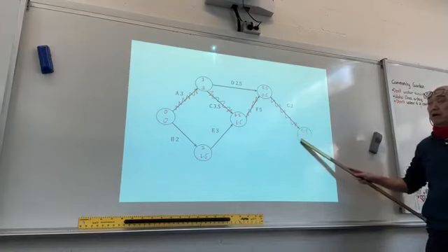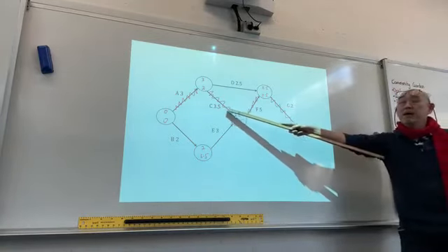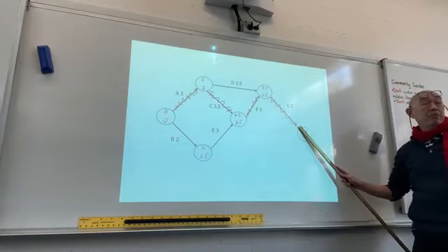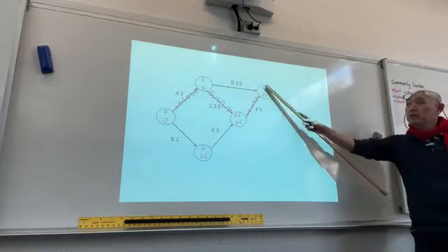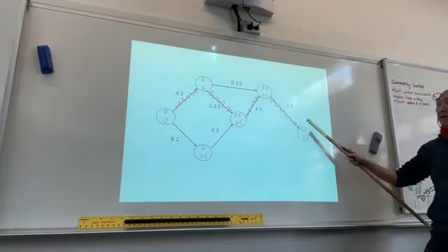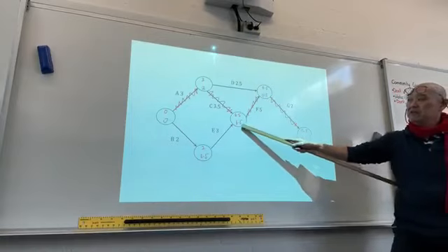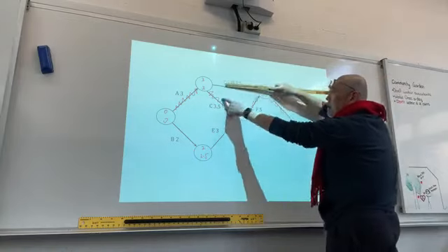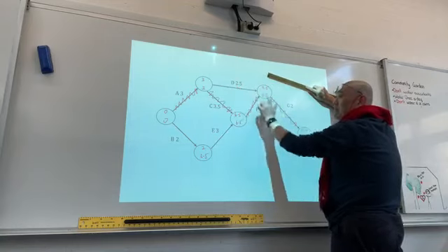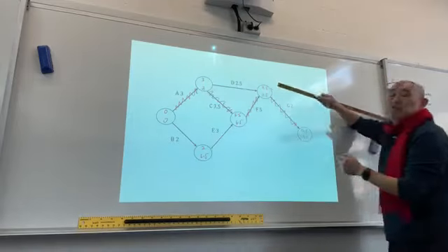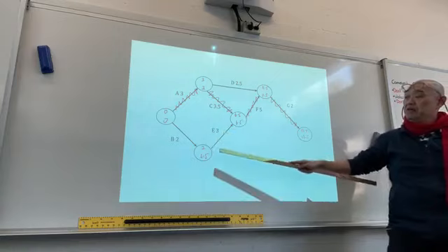Alright? So then from here, the minimum completion time assumes that there's no delay or anything. So sometimes a question will ask you if there's a delay in one of them, how would it affect the minimum completion time? From there, I'm going to work a backward scan. 13.5 minus 2, because there's one arrow going back, so that is pretty straightforward. Take away that, that'll give you this, which is 11.5. Now, coming down here, 11.5 minus 5, 6.5, also one arrow. There are two arrows going backwards there, so you need to work out the smallest amount. 11.5 minus 2.5 is 7. 6.5 minus 3.5 is 3. Therefore, you pick the minimum amount, and that will be there. 3 minus 3 will be 0. Here, coming back, 6.5 minus 3 is 3.5.